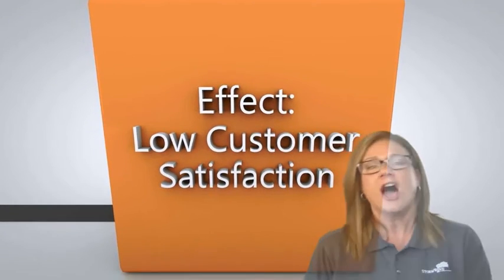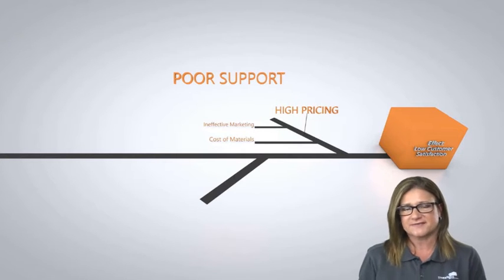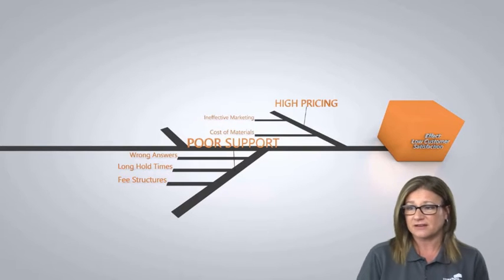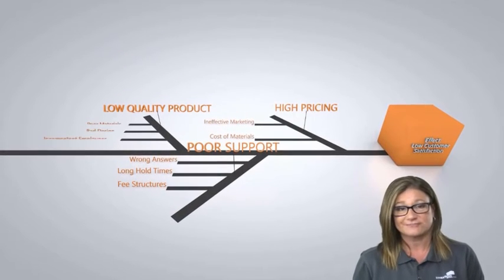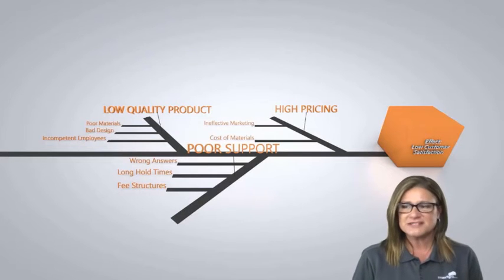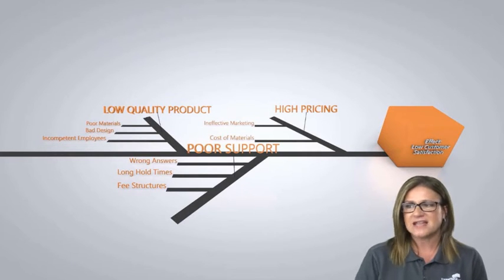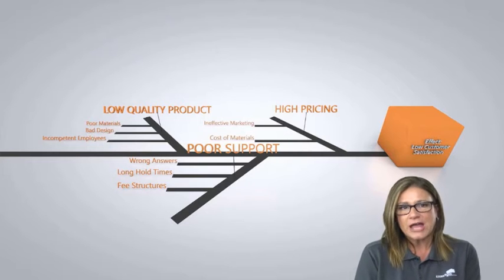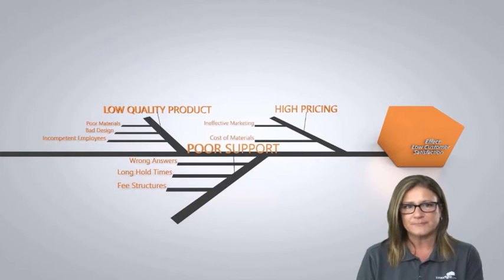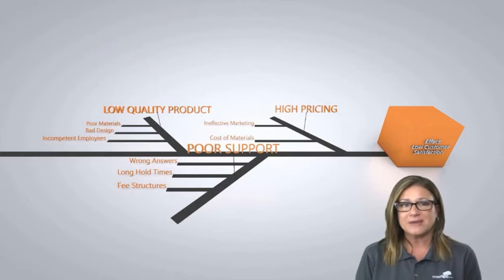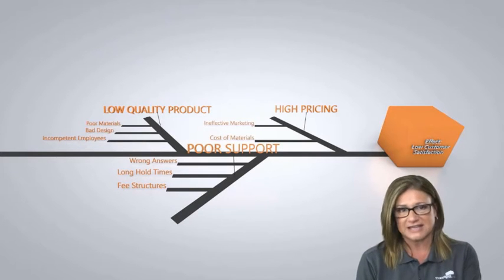Here's a basic animation of a fishbone diagram working backward through a problem. The effect could be low customer satisfaction. One category might be high pricing — with sub-causes like ineffective marketing or cost of materials. Another could be poor support from people — wrong answers, long hold times. Maybe fee structures. Or a low-quality product — poor materials, bad design, incompetent employees. We start with the big effect: customer satisfaction rates are down. That's a risk, and we work backward to figure out how to fix it through corrective action.